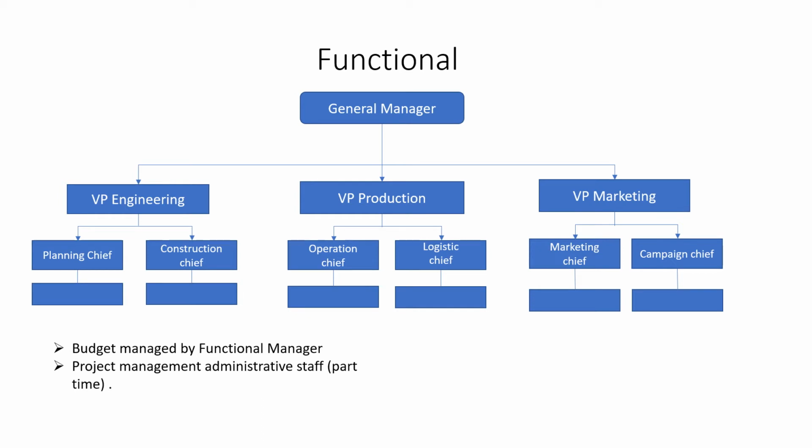Here, the project manager has a minimum role to play or may not have a designated position. Generally, they can be represented as an expeditor or work as a coordinator. In contrast, the role of a functional manager goes beyond and may involve budget allocation, resource allocation, decision making. This type of organization is suitable for manufacturing or engineering companies.